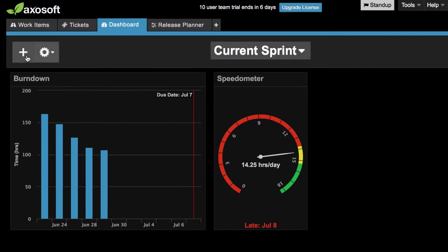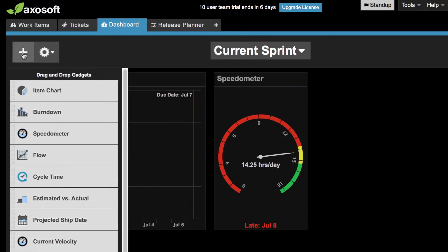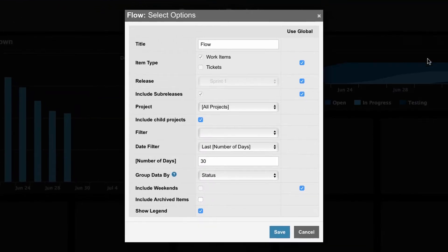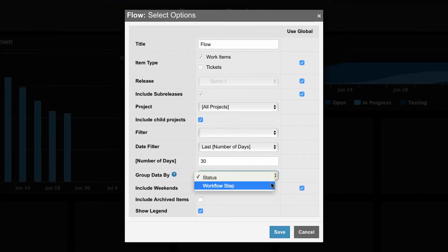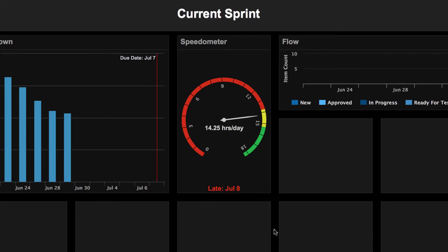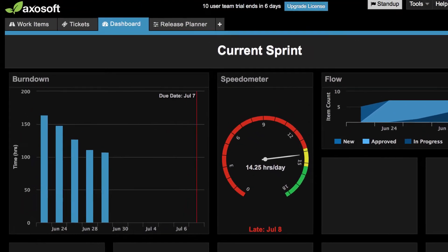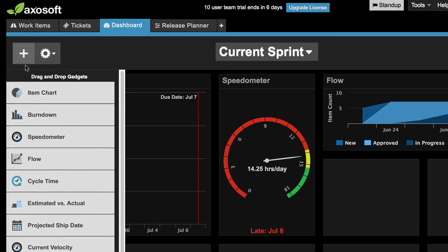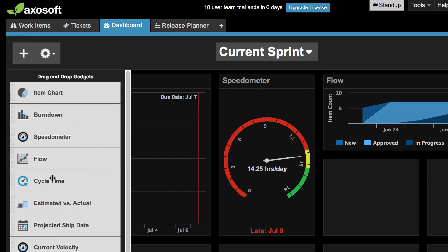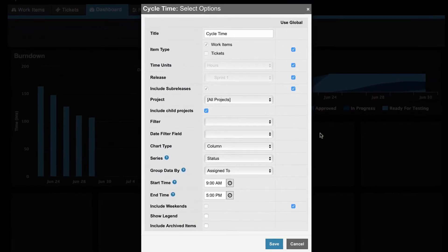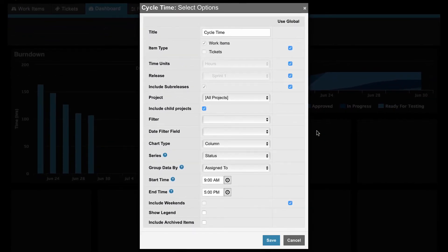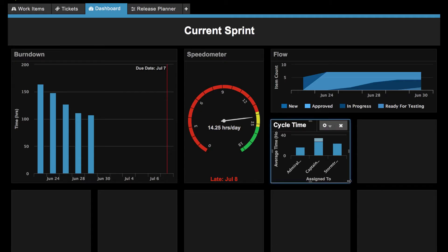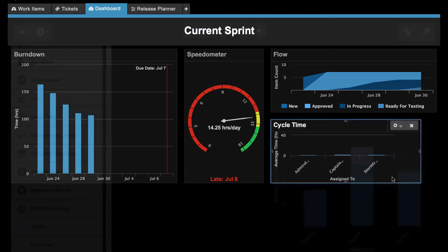We have two special charts, the cycle time and flow. The flow chart tells you how many items are in a workflow step or status over a period of time. It's a great way to spot a bottleneck, and cycle time tells you how long an item has been sitting in a given workflow step or status from start to end. So it's a great way to also break this apart by users to see what the cycle time looks like.